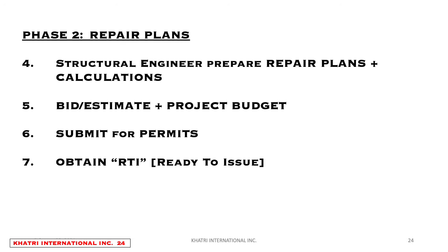I get a lot of questions on this from homeowners and HOAs. Contractors will provide a cost estimate and a scope, and they want to just go and fix it, and they don't want to pull any permits. I highly advise that you don't do that, because if you do it without permits, you will jeopardize your insurance coverage.